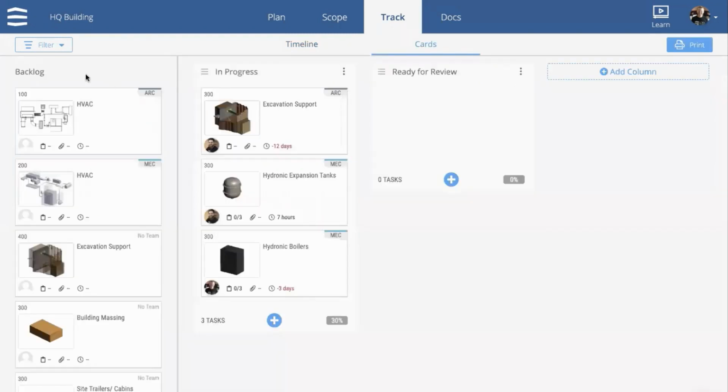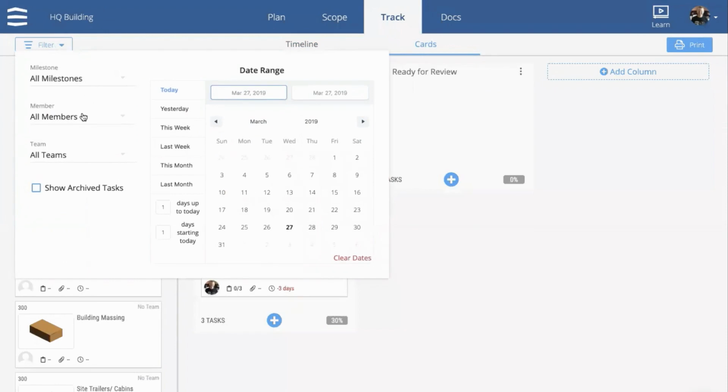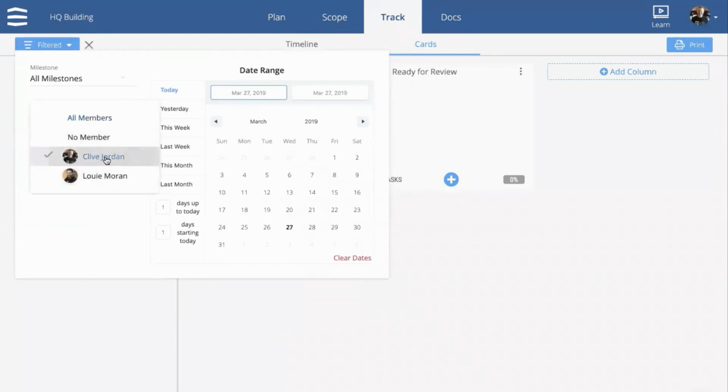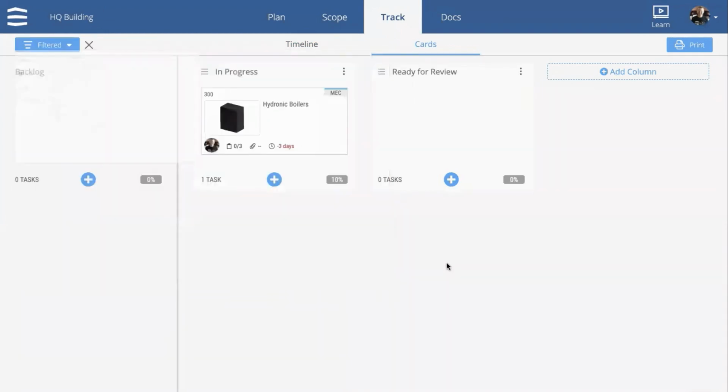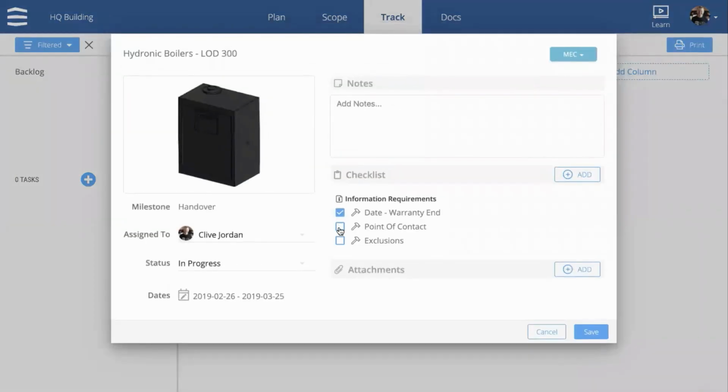But when we work, let me go into the filter now. I would just filter for my tasks only, and I would see I have one task. I can see that I am 3 days behind. It was a bit of a tough deadline you set me there. And if you're in a management position, you can set your filters to a date range. So it could be months or weeks.